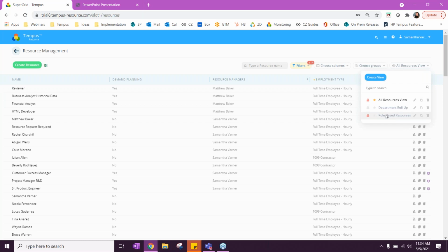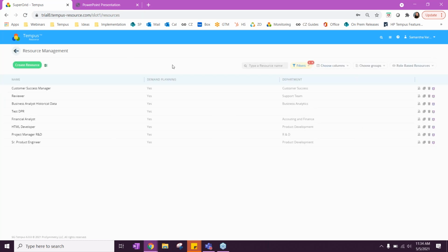I have a specific view set up to see the ones that are in my system. Those demand planning resources, like I said, are role-based resources. For some organizations, you may have HTML developer, maybe Python. You may have a senior product engineer, a senior technical engineer, or project manager for your different divisions or roles. Really, those teams, those roles that need to be working on those projects, but maybe you don't know just who yet. That's the power of these demand planning resources. We are going to go ahead and create one real quick.